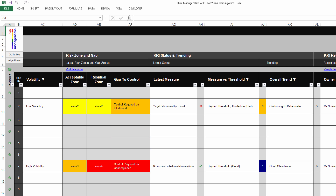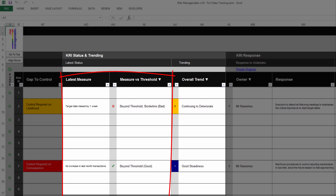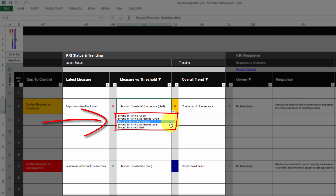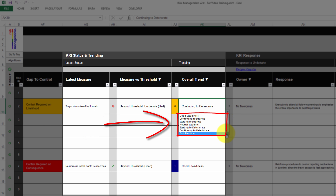The following sections are those you update regularly. The section KRI Status and Trending is where you record the latest status of the KRI. You record the latest measure and select one of five items regarding how this latest measure compares with the threshold set in the KRI Scrutiny section. Taking into account the current KRI status, you then select one of seven possible overall trends, from a good trend to a bad trend.